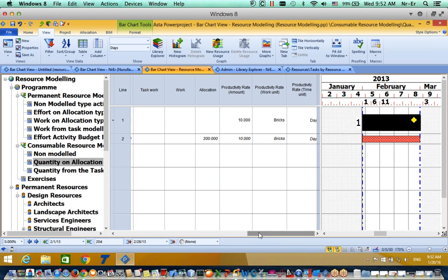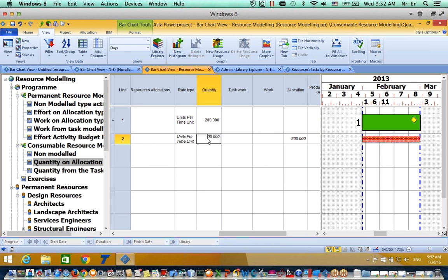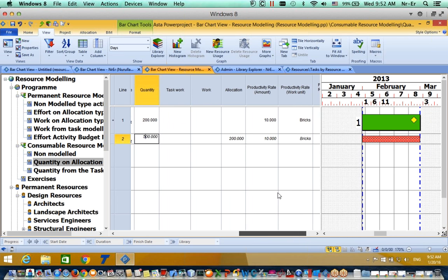Let's say that this is not 200 and this is, let's say, 500 bricks I have, and my production rate is daily 20. Okay, and the system calculates for me that you will complete your task in 25 days.